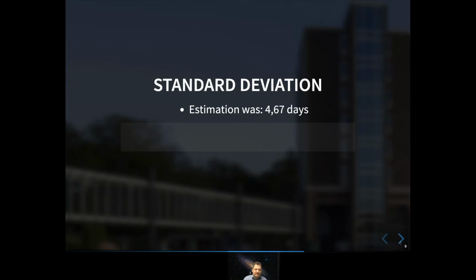These estimations are imprecise. These are no measured values, kind of. So it also doesn't make sense to have a super complex mathematical calculation. This is usually in every project management book, simplified. And how you do it is you say sigma, you calculate it by pessimistic minus the optimistic value, and you divide it through 6. And then you get the standard deviation, also we call it sigma.